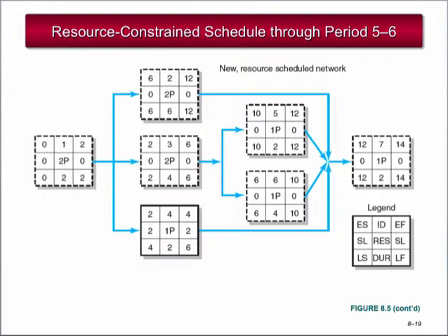If you compare the two networks, you'll see that the slack has been reduced significantly in the resource-constrained project. Also note that the number of critical activities, 1, 2, 3, 5, 6, and 7, has increased from 4 to 6. By leveling or smoothing programming needs, each period of the project no longer exceeded the 3 available programmers for the project. Therefore, the goal of resource smoothing was achieved.